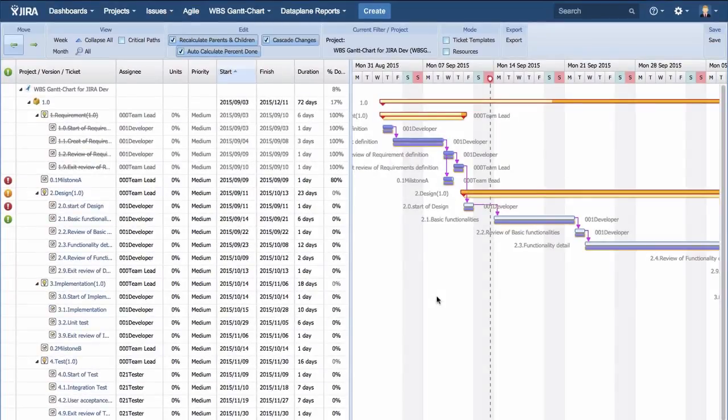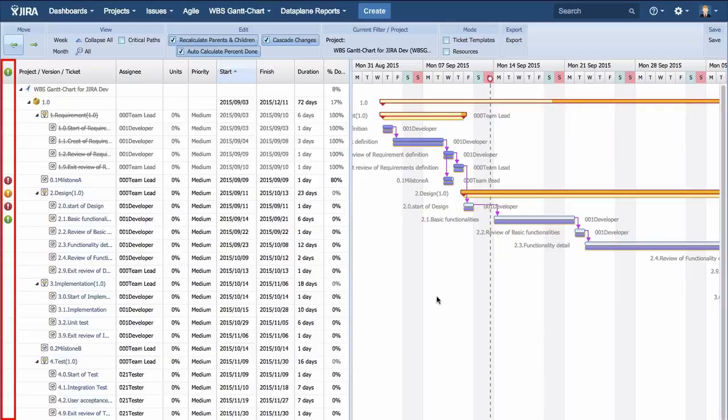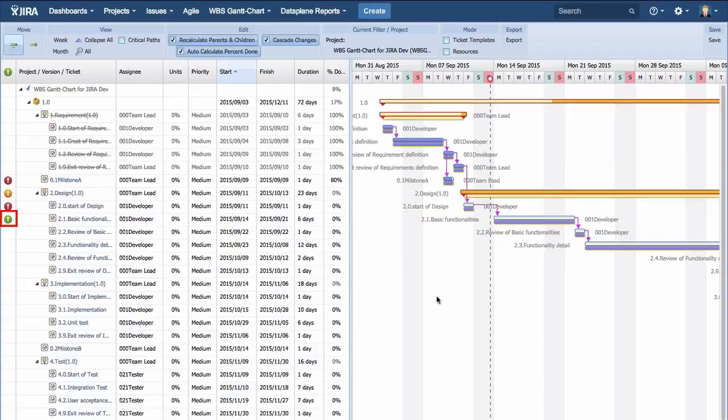In the WBS screen, a warning mark appears. The green sign indicates the planned start date of a ticket is coming within three days.